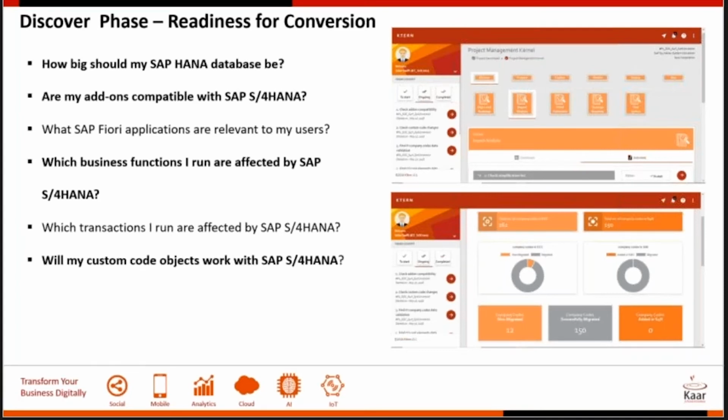So what are these partner add-ons? You would have bought partner add-ons that have been certified by SAP that could be installed into SAP, and you've been using them. But now when you go to S4, you'll have to ensure that the same add-on works on S4. So if you have a third-party add-on, our suggestion is, soon after the assessment phase, get in touch with the third-party vendor, and ensure that he understands that there are changes that could be required in the software.